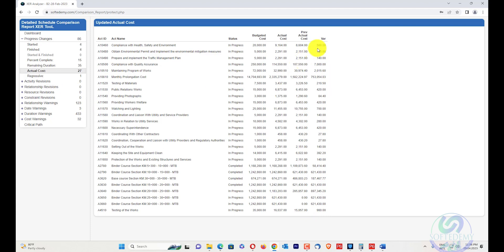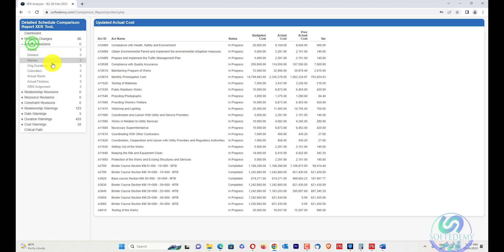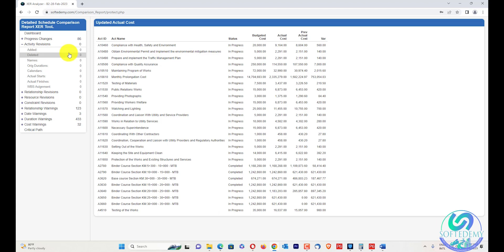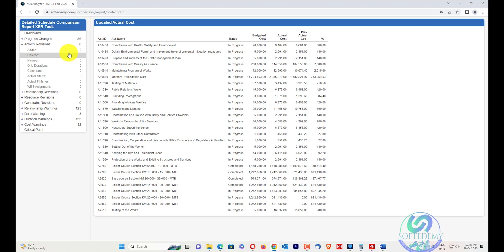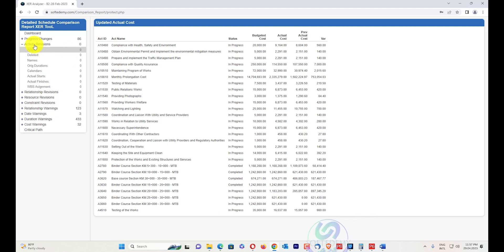Activity revisions contain several sub-tabs: how many activities have been added, how many have been deleted, name changes during the update, original duration changes, calendar changes if a new calendar was assigned, actual start and actual finish changes, and WBS assignment changes — all appear in the activity revisions tab.